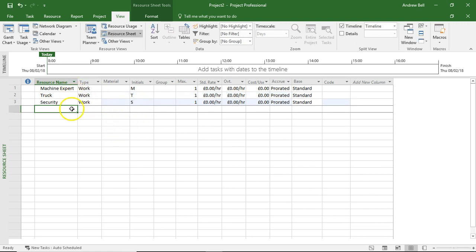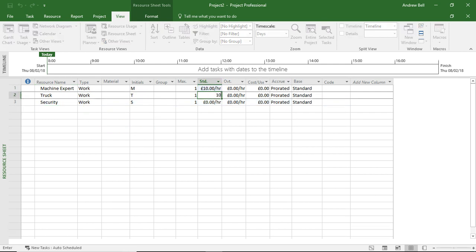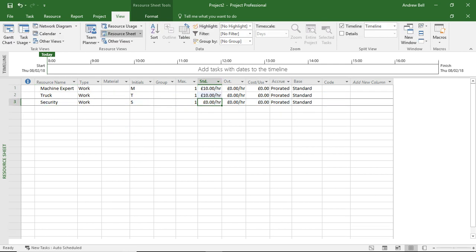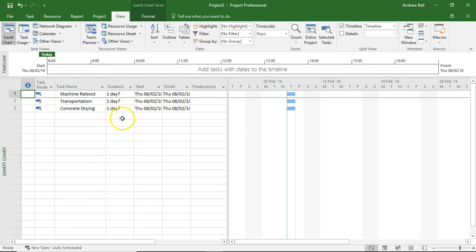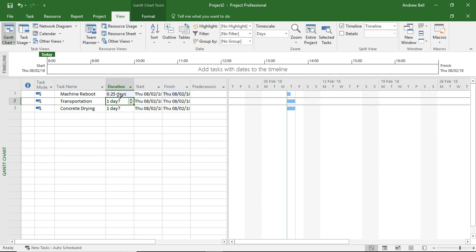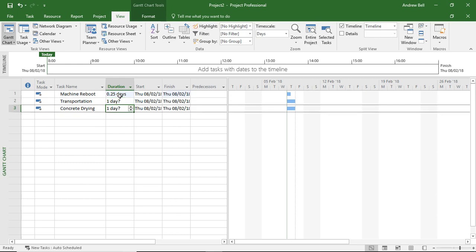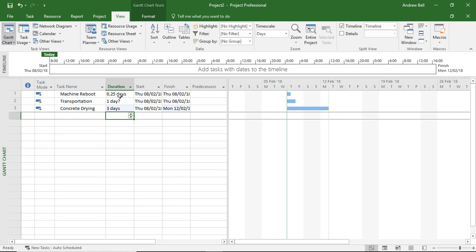I've added some resources into the tasks. Let's just give them ten pounds an hour as a pay rate and we'll see some costs associated with these tasks. So go back to the Gantt chart view. The machine reboot is going to take, let's say, a quarter of a day - two hours. The transportation, let's make that a day. The concrete drying, let's make it three days.